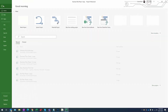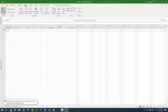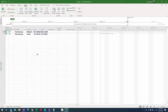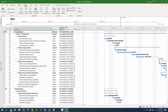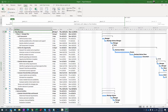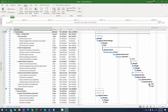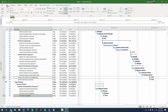Now I need to link the external tasks into the main project. To do this properly, I'll open a blank project, go to the project ribbon, click 'sub project,' and insert the external activities project. Then insert the business plan as well. Now both projects are loaded. I'll expand the view. Tasks from the external project are floating early; I want them to align with reality. I'll select row 6 and row 23, go to the task ribbon, and click the chain link to create the link.